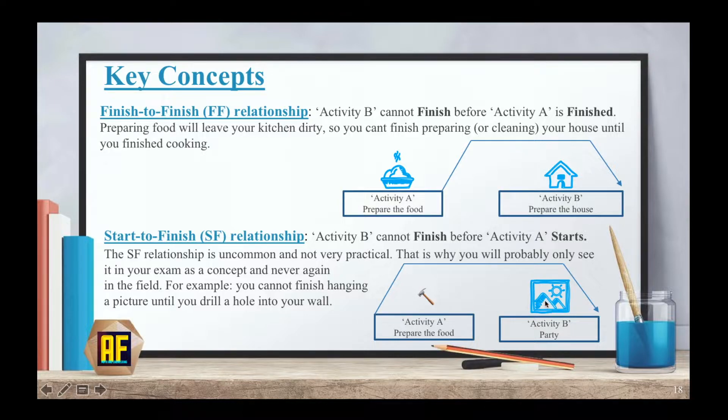Start to finish relationship. Activity B cannot finish before activity A starts. The start to finish relationship is uncommon and not very practical. That is why you will probably only see it in your exam as a concept and never again in the field. For example, you cannot finish hanging a picture until you drill a hole into your wall. I have no idea why they even added it. I've never seen it. I have one example from the exam that I did back when I was in school and I'm going to solve it, not in this video but in another video in this series, and then you can forget about it.